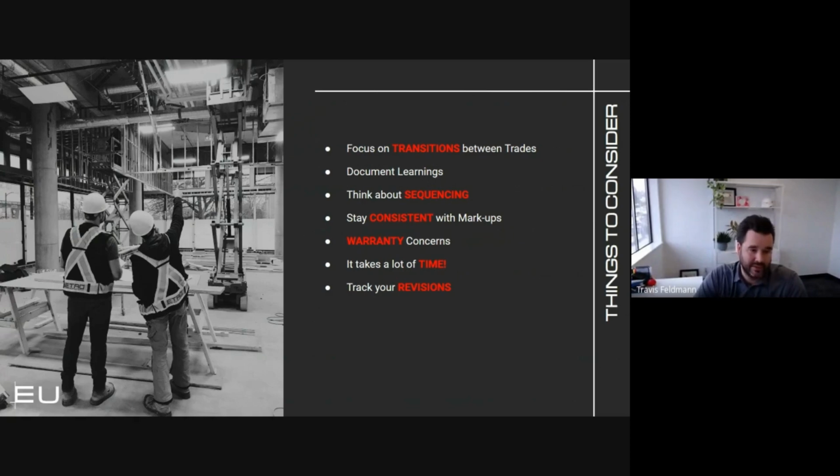So, you know, running through it at a high level, foundation waterproofing to exterior vertical wall cladding or windows, anything to do with openings, whether it be cladding to windows, cladding to louvers, window to louvers, whatever it's going to be, interior to exterior transitions, and then of course the starts and stops between all our sub trades.